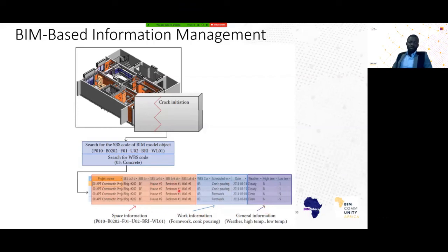So with this, we'll be able to say, oh okay, we have concrete carried out on the wall at a particular date. What was the weather condition on that day? What was the temperature like? And then also we can have information like the laborers that carried out the construction activity and the supervisor that was on site for that particular day. So from this information that is being retrieved, we'll be able to have a general knowledge of what transpired on the day the wall was constructed, what went wrong, and who is responsible for that particular crack in the wall. So basically, this ensures that information is managed adequately, and it is retrievable at any point in time when the particular information is needed.